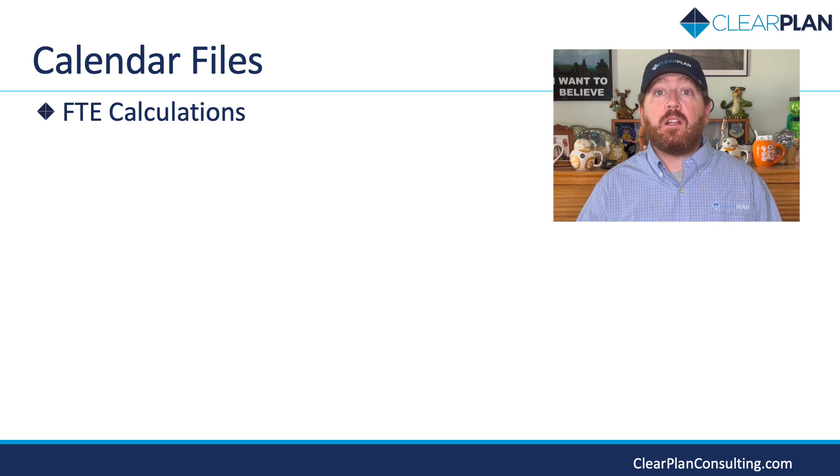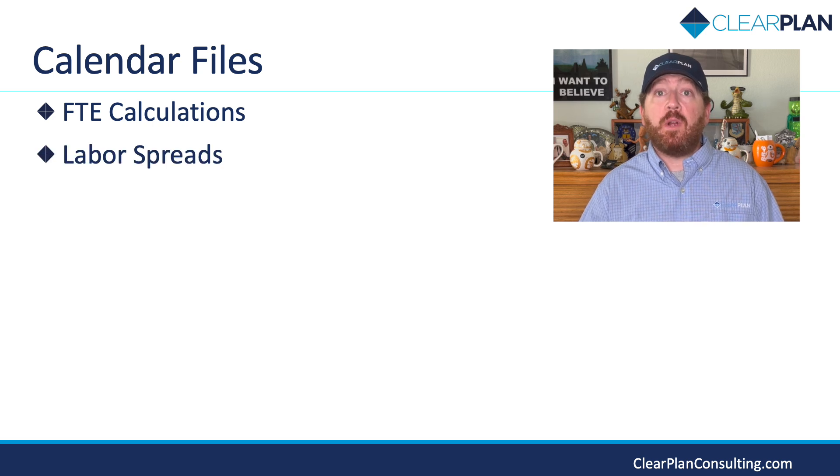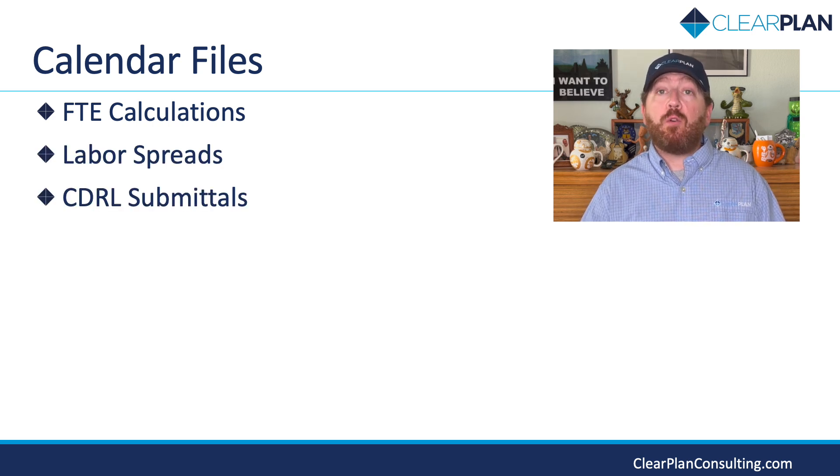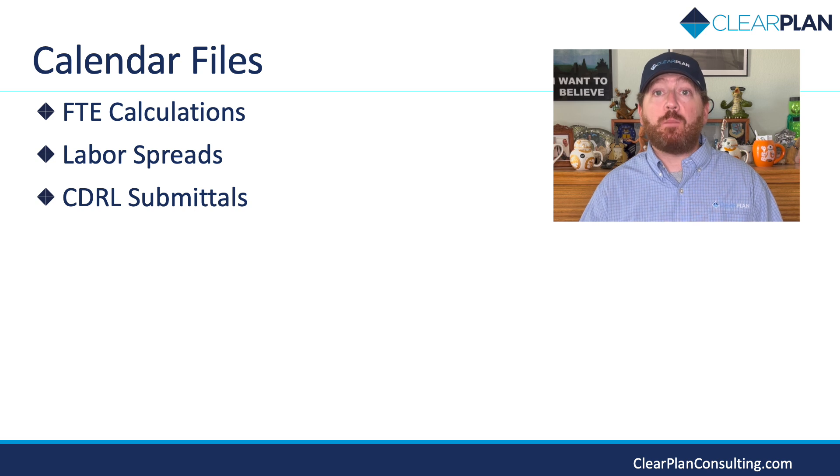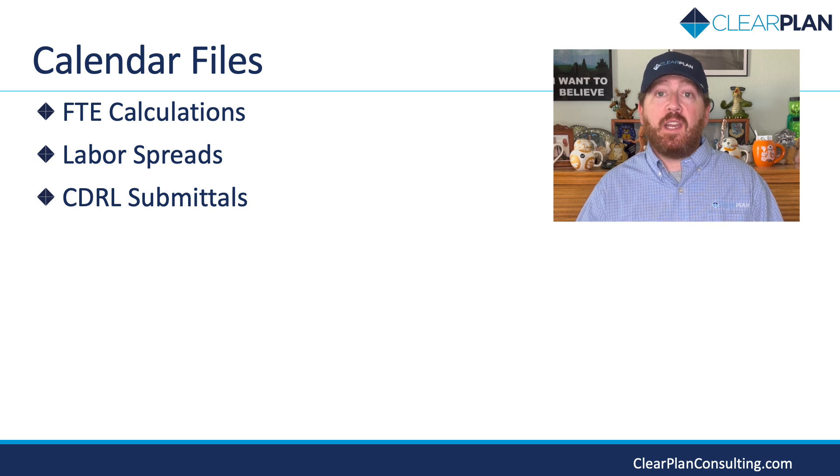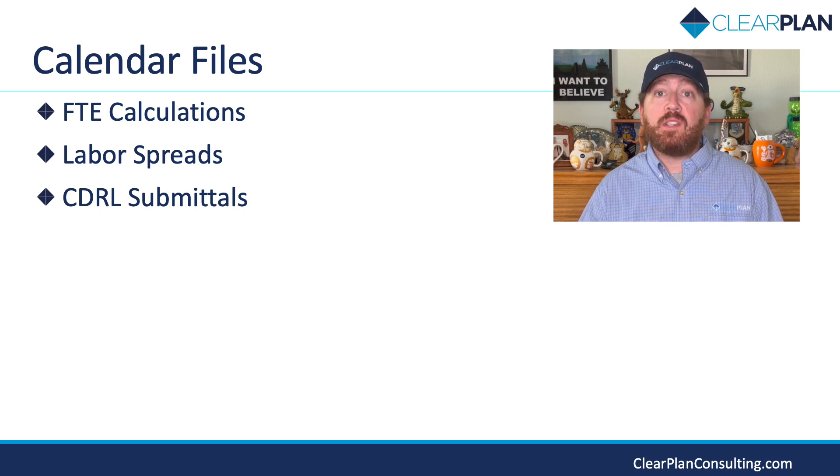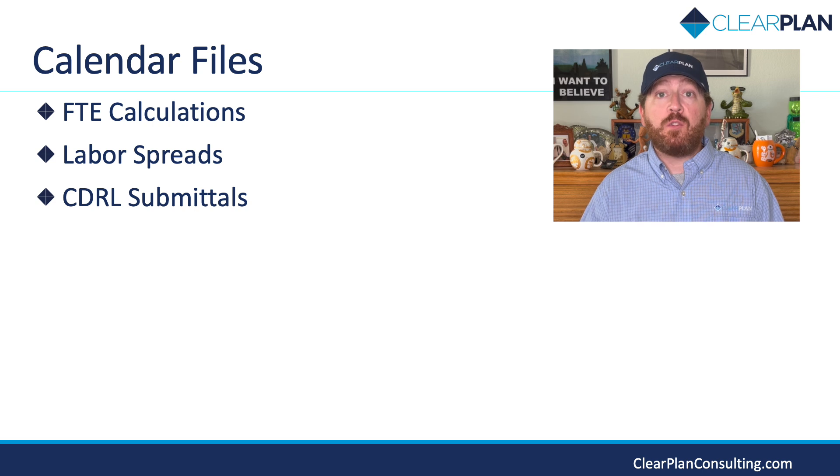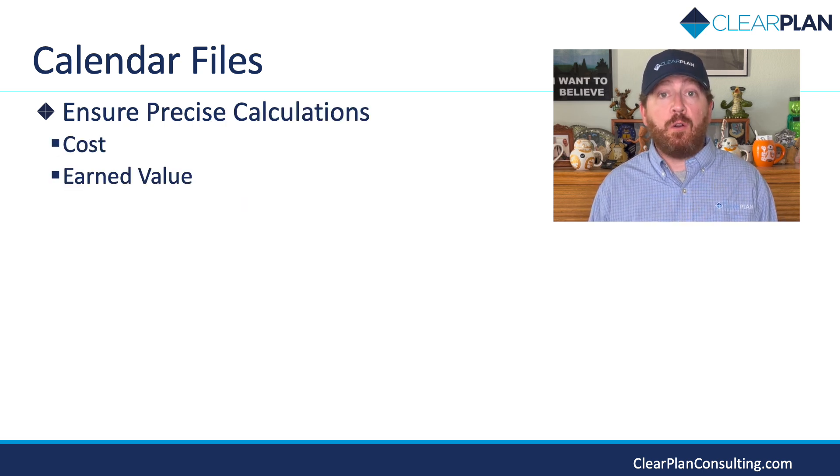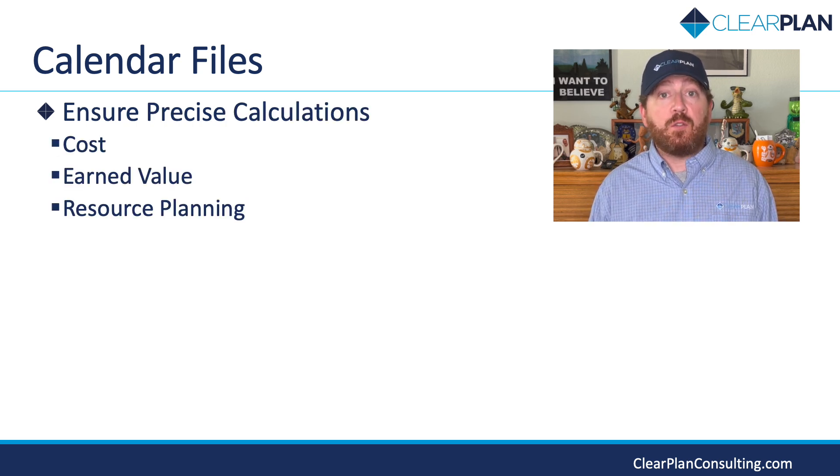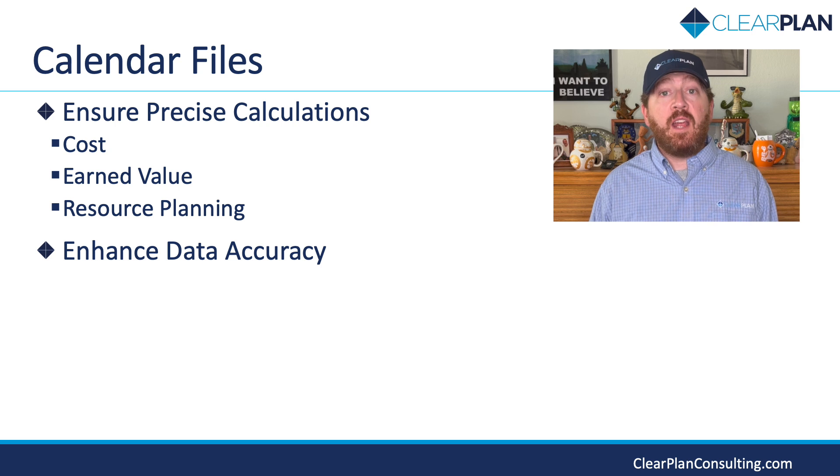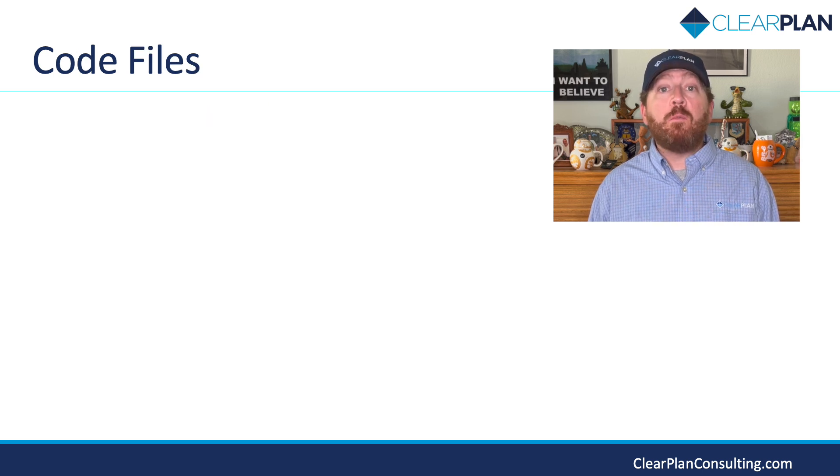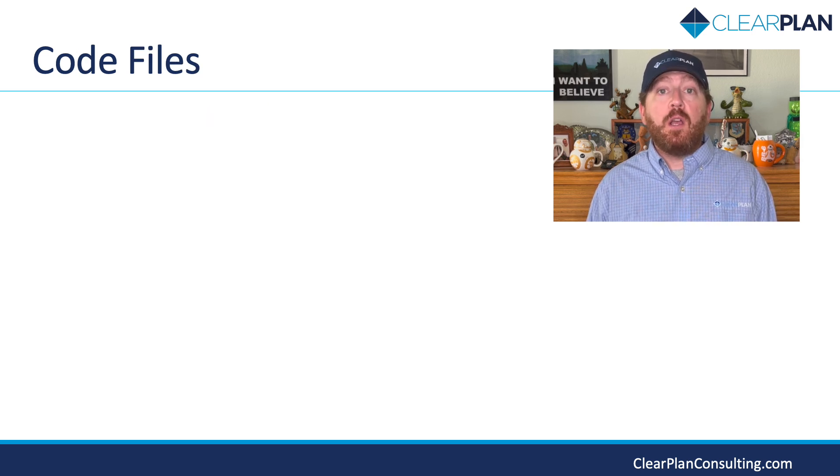FTE calculations, labor spreads, and CEDRAL submittals play a crucial role in accurately analyzing project performance. By setting up calendar files tailored to your organization's working schedule and your customers' requirements, you can ensure precise calculations of cost, earned value, and resource planning, thus enhancing the accuracy of project data and results.